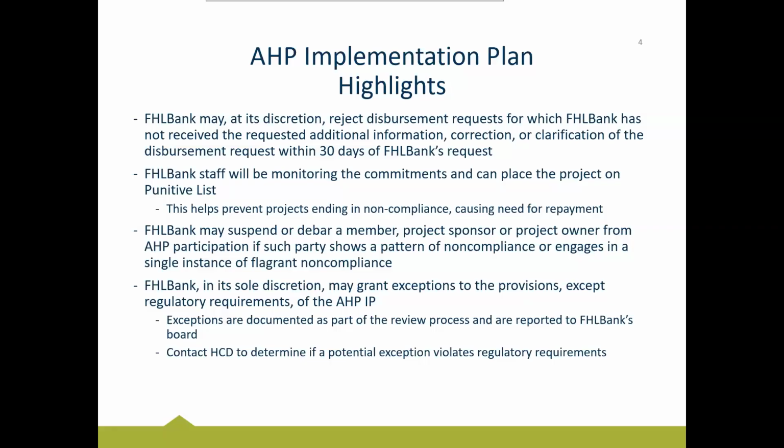So that's the reason that we're watching those scoring commitments and that a project may end up on the punitive list or on a disbursement hold. That punitive list entry, that disbursement hold would just be saying, all right, we're going to put a pause on the project and you need to only submit units that meet a specific commitment for a little bit. And then once you get caught up, we'll re-open the project to submit whatever you would like regarding your disbursement requests. Okay.